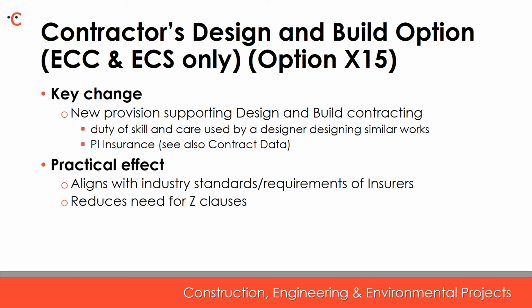First, the contractor's design duty is aligned with industry standard as preferred by insurers. For example, the contractor's standard of skill and care of design is that of professionals designing similar works. Second, there is an obligation on the contractor to maintain PI insurance. This is intended to deal with the requirement for contractors to provide professional indemnity insurance, standards of skill and care and IP licenses that users previously had to incorporate using the Z clauses.